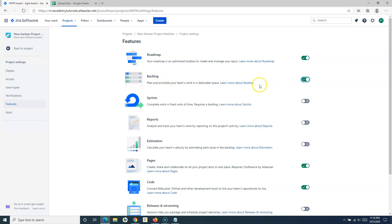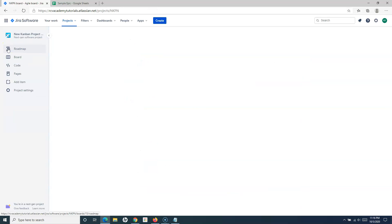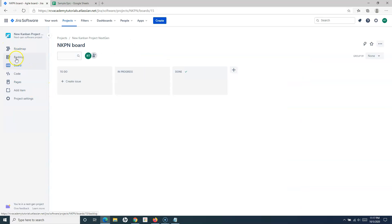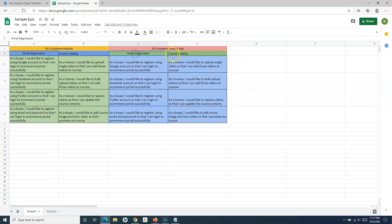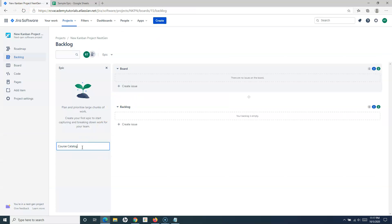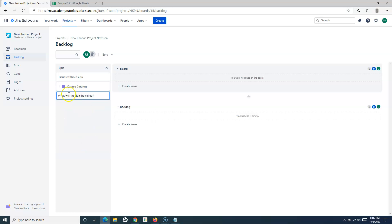As soon as I switch on this toggle, the backlog will be enabled for this particular project as well. So I can go to the backlog now. Here I can start creating the epic. In the backlog in this next gen Kanban, if the work items that have arrived are big and need to be broken down into smaller pieces, I can start with an epic. There is something big that needs to be worked on — for example, a course catalog — so I can create an epic.